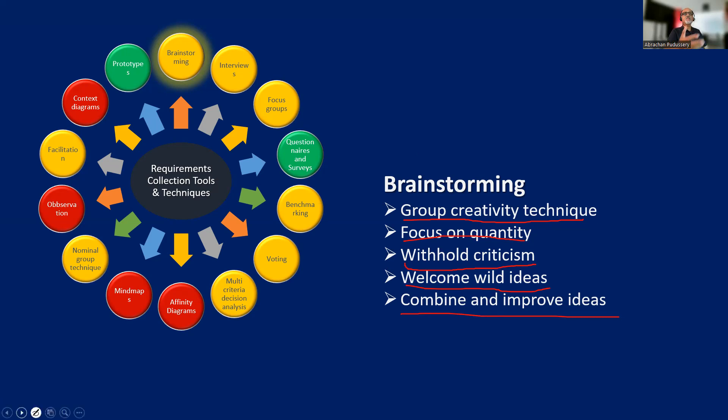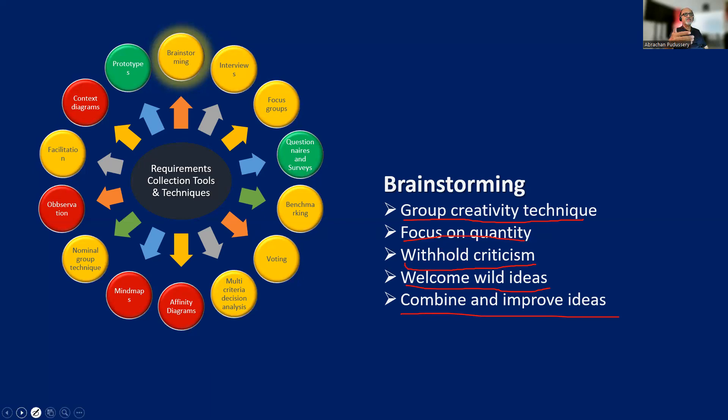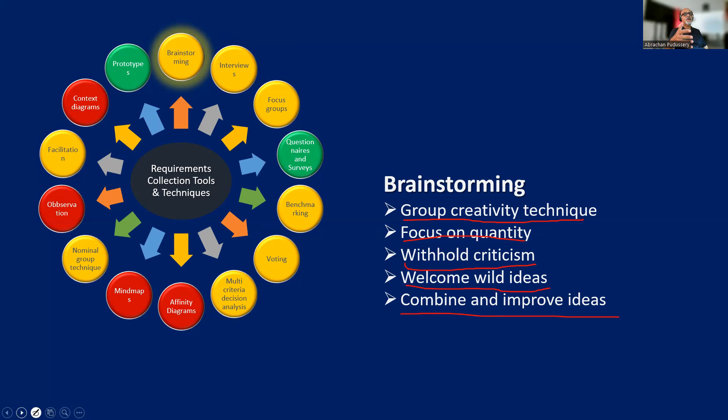Who are all the participants of brainstorming? Generally, the impression is brainstorming is always attended by experts in the domain. But in real practice, sometimes we invite people without the domain knowledge. They will be able to give very wild and fresh ideas because they are not inhibited by the norms of the domain.